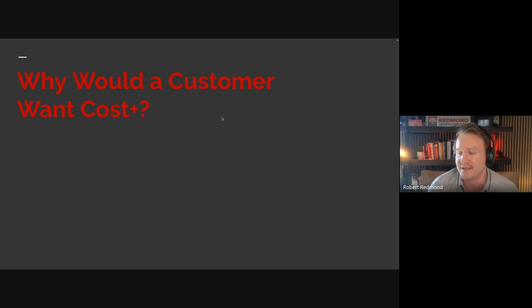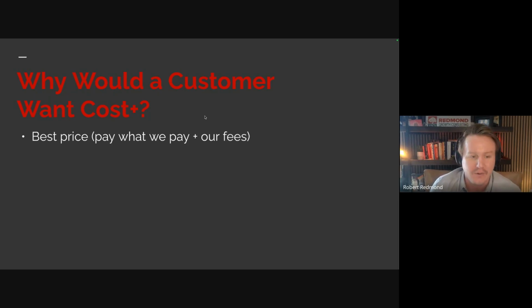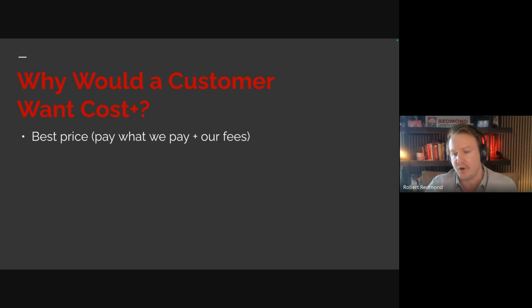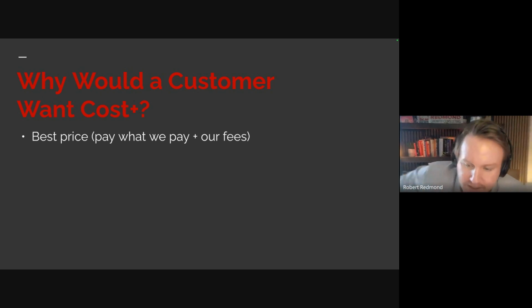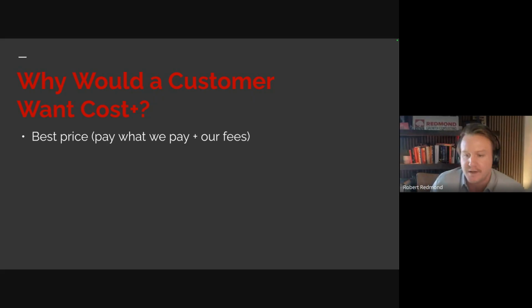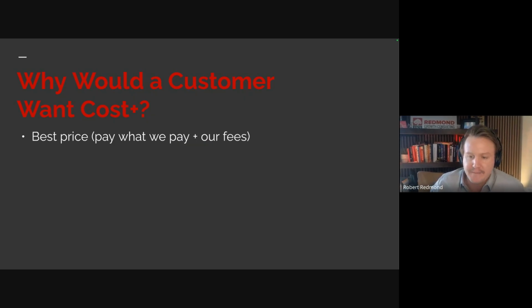So let's talk about it. Why would a customer want a cost plus? Because with the cost plus method, you can tell the customer they are always going to get the best price on what it takes to do the scope of work. What do I mean by that? With a cost plus, you pay what we pay plus a fee.